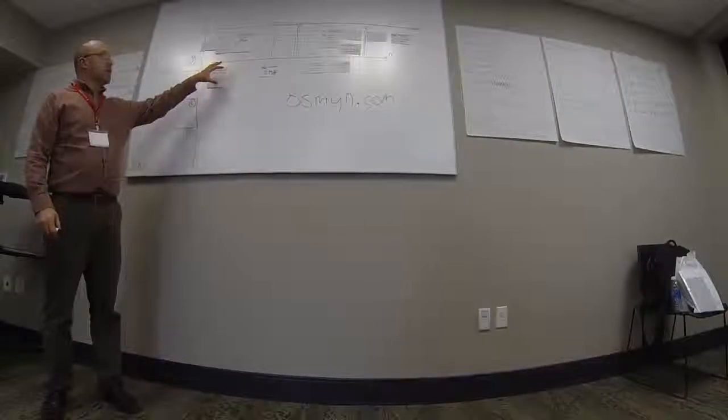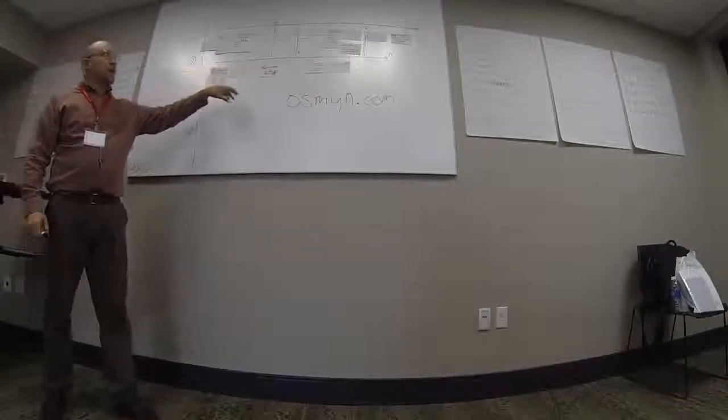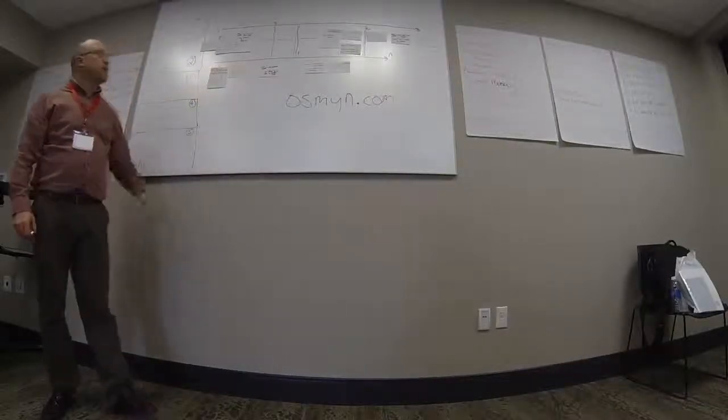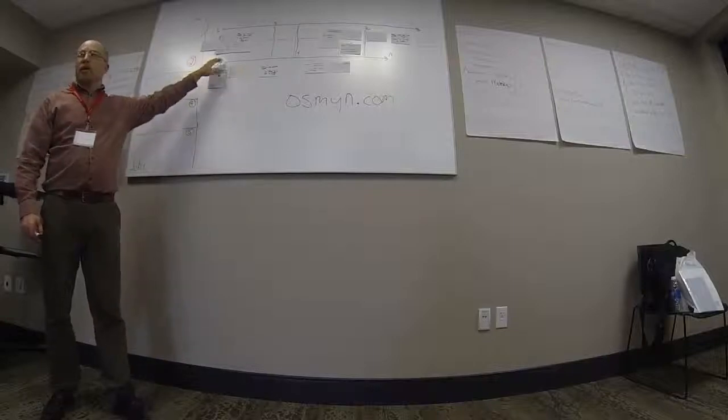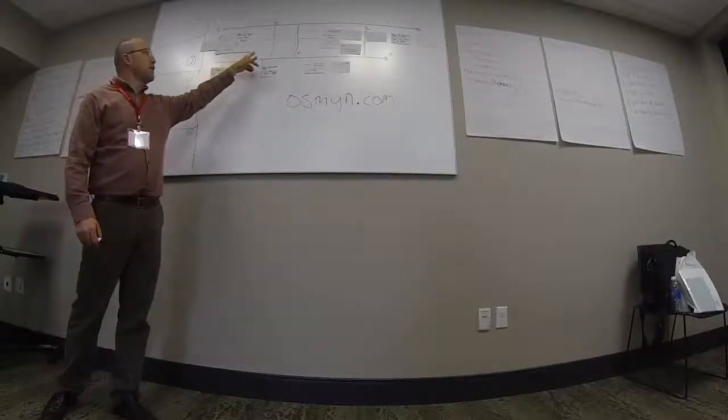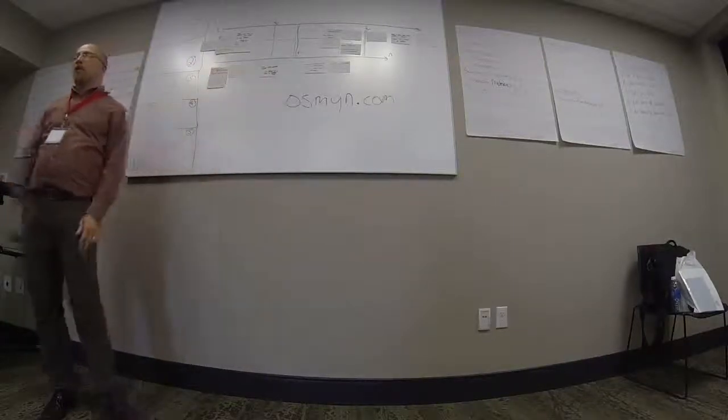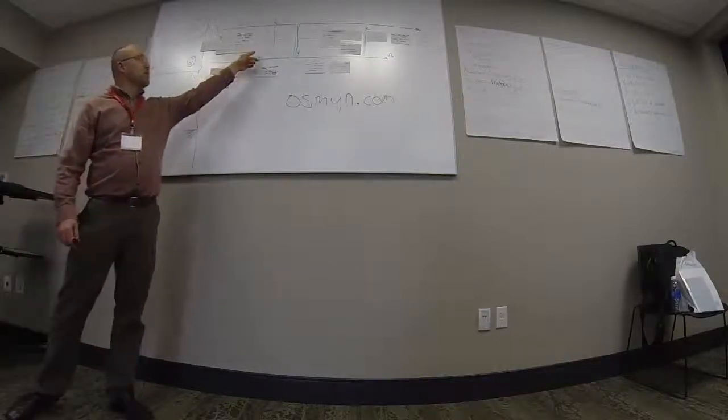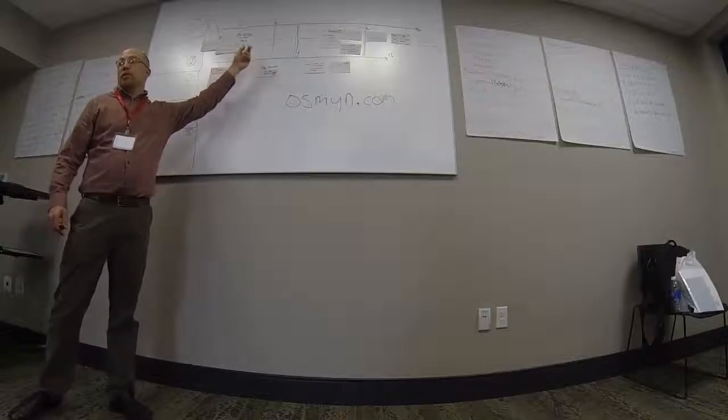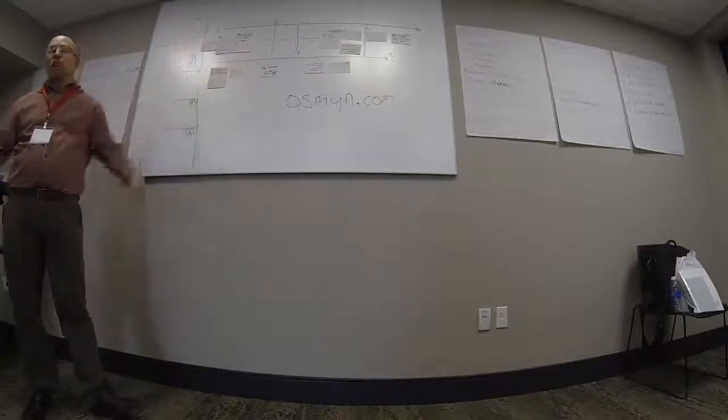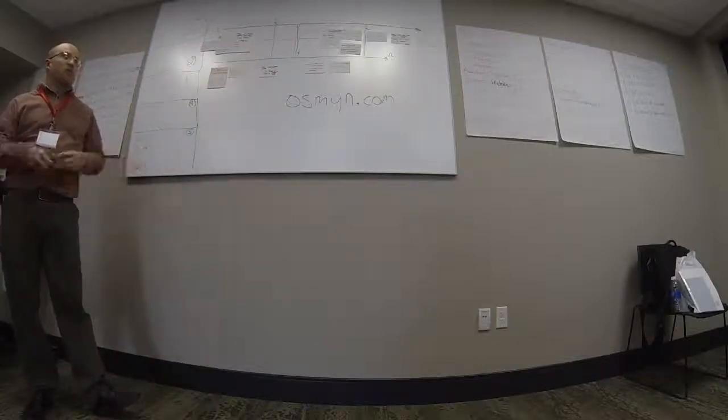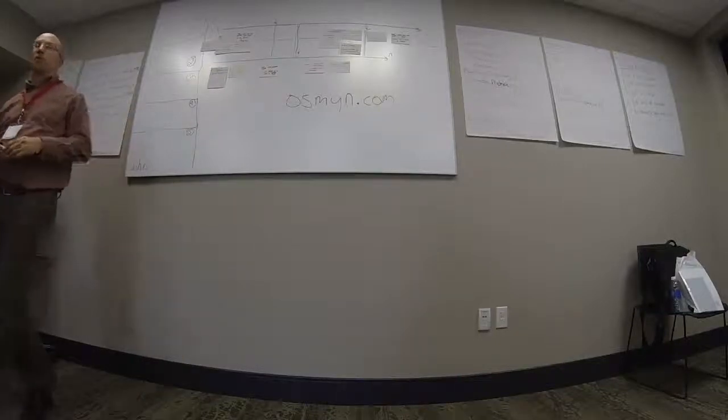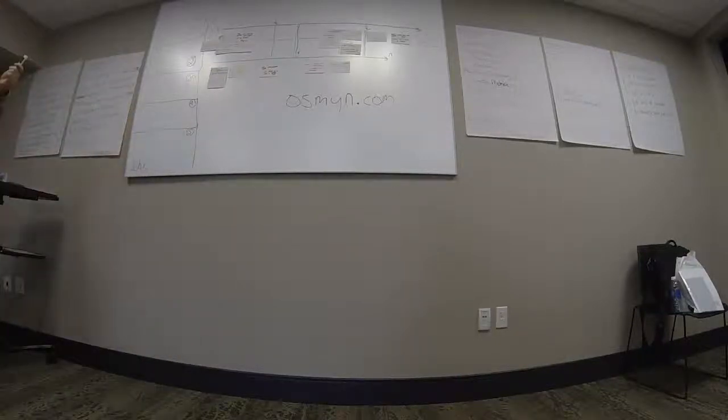So we start looking at these, start doing some preliminary designs, thinking about what holes are in here. Like, there's nothing in here for picking out a look and feel for the site. So we might insert a couple of stories above this feature set line that we just have to do. We'll give you three options for a look and feel for this website. So we'll insert a couple of stories.